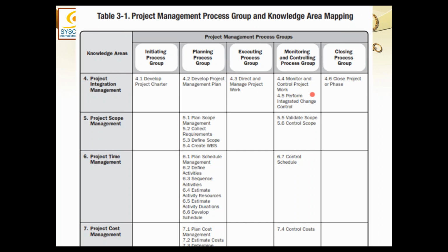So for all practical purposes, when it has gone to integrated change control, that has actually gone to the project board, and they have the authority to approve a change request, or to reject it, or to delay it, or to pend it, or whatever they decide. But from the PMBOK view, we would say that all change requests are processed in integrated change control.